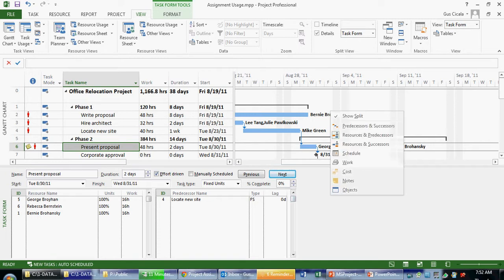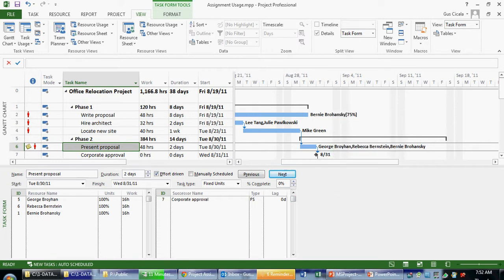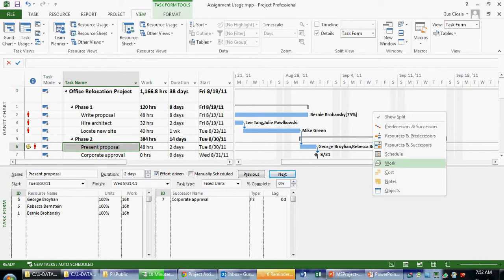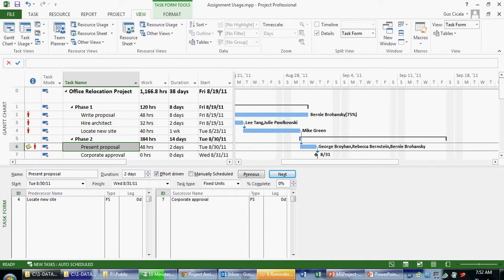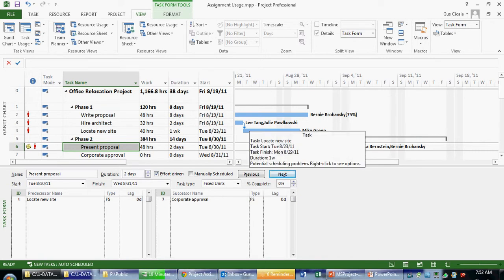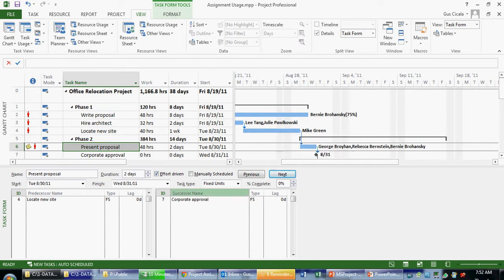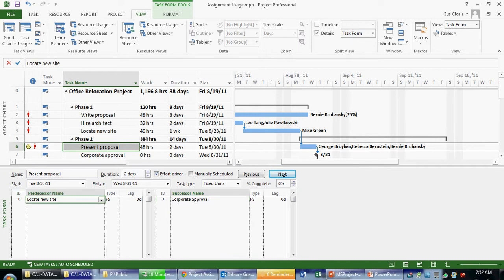I can see resources and successors, or the tasks that are following this task. Or I can see the successors and the predecessors. And this becomes useful when there are a large number of tasks linked to a single task. If we were to view that information up here, that can get a little bit confusing to see, for example, seven arrows coming into the same task. So this gives me information about the task that succeeds this task, and the task that precedes this task.